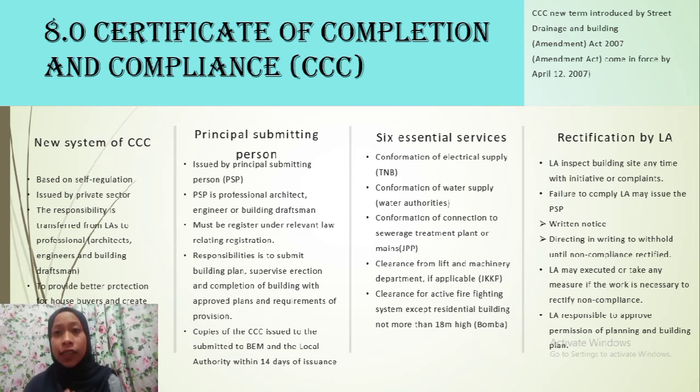For CCC, it stands for Certificate of Completion and Compliance and is a new term introduced by the Street, Drainage and Building Amendment in 2007, which came into force on April 12, 2007. The CCC is a new term that replaces the Certificate of Fitness for Occupation (CFO). The new system of CCC is based on self-regulation and is issued by the private sector.